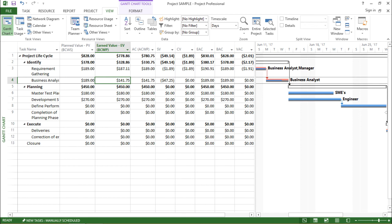By keeping the duration constant, if we change the percent complete, it does affect our cost table as well or the earned value analysis table as well. So this was all about this video. Hopefully you liked it.